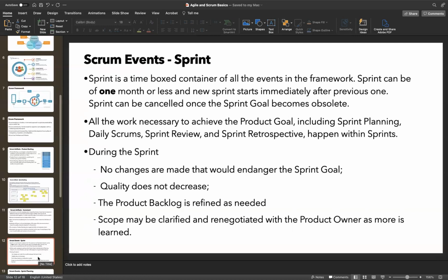So infrastructure becomes a problem in this case. You negotiate with your product owner and say, infrastructure needs to be there before I start my work. Then you take back the work to the product backlog and you renegotiate your sprint. So that way it can be done.